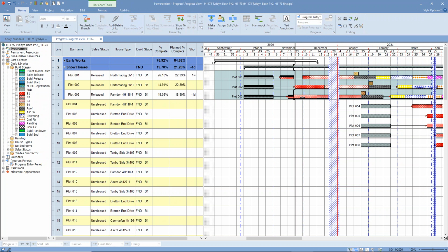But we're going to knock a date. It's only going to take us 15 days to do that now, so we can move that along. So I would say this will be the classic way of doing it, in that everything that you've done is completed, and in the past, everything that remains to be done is in the future. Because if it's not in that way, you cannot use the future dates to tell people when they're doing things, because it will be still jagged.